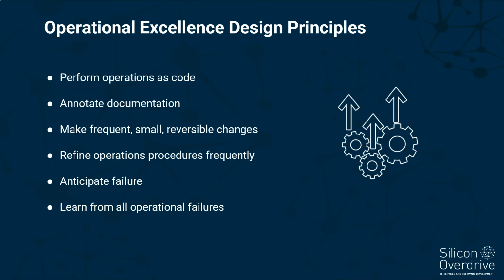Anticipate failure. Perform pre-mortem exercises to identify potential sources of failure so they can be removed or mitigated. Test your failure scenarios and validate your understanding of their impact. Test your response procedures to ensure that they are effective and that teams are familiar with their execution. Set up regular game days to test workloads and team responses to simulated events.